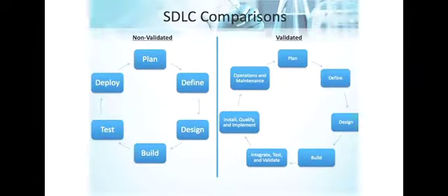All right, so let's discuss the impact of validation on the SDLC process. These two charts are representative. Depending on the company you go into, they could have their own definition for what their SDLC is. Standard: plan, define, design, build, test, deploy. From a representative standpoint, what's the difference of the typical SDLC to one in life sciences? Well, they're similar, but there's a lot more rigor around the documentation in all phases. So that would be around the requirements, the system setup, how you implement it, and then the testing of everything of the actual system during the deployment phase, and then even after go live.